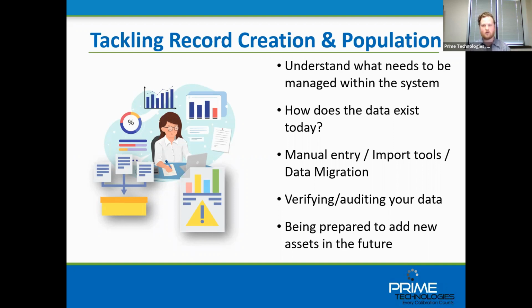Once the data is ready to go and set in there, you're probably going to want to verify or audit the data. If you're working in the FDA or pharmaceutical world, you may need to do a very detailed validation of that information, where maybe you're taking a net sample and doing a direct comparison. In another area, you could be doing a direct comparison, or you're just going through and making sure that your workflows are working and everything looks the same and it looks like it's there. This is going to be up to the customer, your regulatory requirements and your specific needs and wants, but it's always good to plan on how you're going to verify that the data was pulled into the system correctly and everything's functioning the way you expect it to.